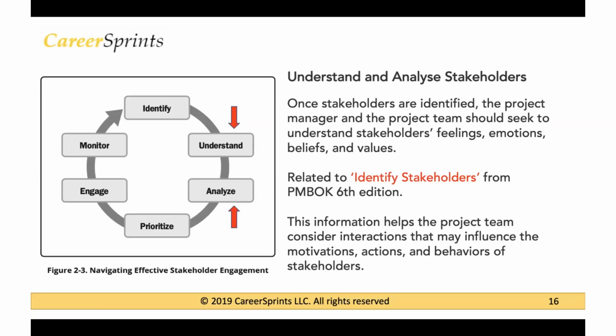So what is the kind of information that you will capture? You can capture their authority in the project, their needs or their urgency in the project, and how relevant they are to the project. Some stakeholders may be totally disconnected from the project. Although they may be senior people in your organization, their influence doesn't really matter on the project because they are not really connected to it. So you will understand their authority, their feelings, their emotions, their beliefs, their values, and gather as much data as you can about your stakeholder so that you're better able to classify them, manage them and engage with them.